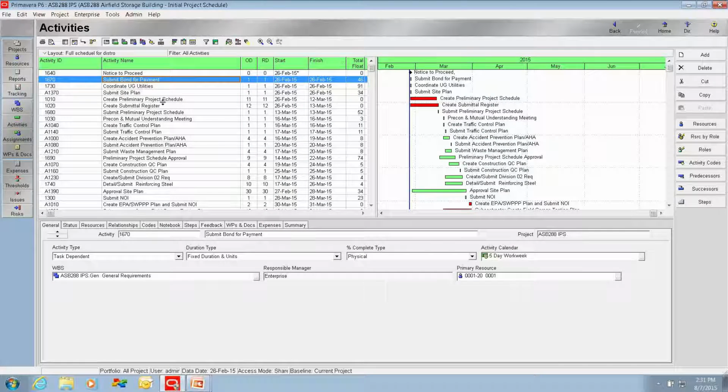The reason we have 10 and 30 is because when this data is exported via the standard data exchange format, the activity ID field will only consist of 10 characters, and the activity name field will only consist of 30 characters. So it's not that the schedule cannot have more than 10 and 30, it's just that only 10 and 30 will get exported to QCS.